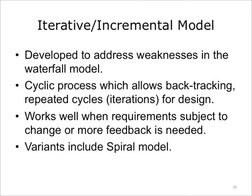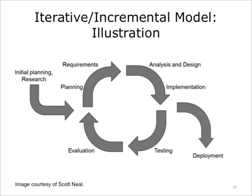The iterative and incremental models were developed in response to identified weaknesses of the waterfall model and are often considered cyclical in nature. This approach works well in environments where perceived requirements are subject to change as the project progresses or where more feedback is warranted. In iterative models, the phases of software development take on a more cyclical nature — starting with an initial planning phase and ending with deployment, with cyclic interactions in between or even after the initial deployment. Several deployment cycles of the product are possible as the software becomes further refined, analyzed, tested, and as new enhancements are added.